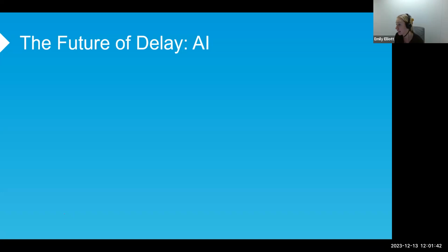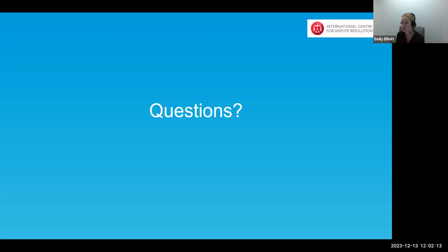But I think it's definitely something that hopefully everyone on this webinar might think is quite interesting. There are various different approaches to concurrent delay depending on the applicable law. For example, some jurisdictions may require determination of a dominant cause of delay, so they look at whichever is the greater delay, whereas other jurisdictions may prefer some form of apportionment of the extension of time and associated prolongation costs.